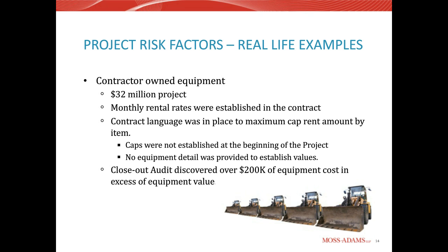And then another critical thing is also to establish those values, and also throughout the project, making sure you're getting enough information about the pieces of equipment. A lot of times we'll see general contractors switch pieces of equipment out and then start billing again. So let's say for the pickup truck, they have a person on the job for 8 months, and then he switches out and a new guy comes on to replace him.